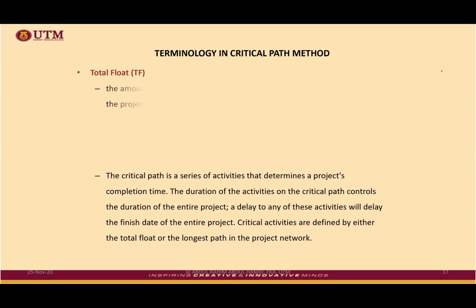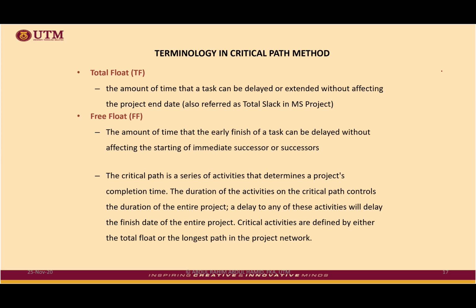Then what else? Total float and free float are similar. Okay. We can define total float for either AOA or AON PDM. But PDM is much easier because everything is inside the box. It is late finish minus early finish, or late start minus early start values of an activity.